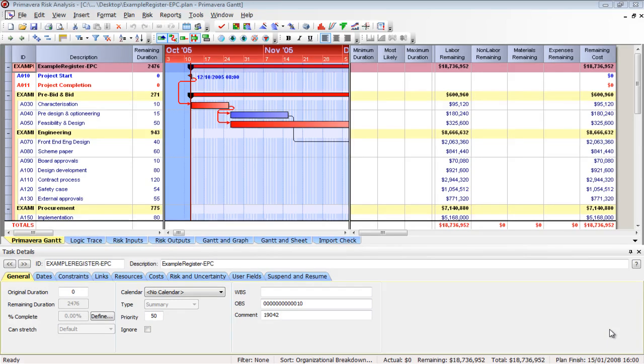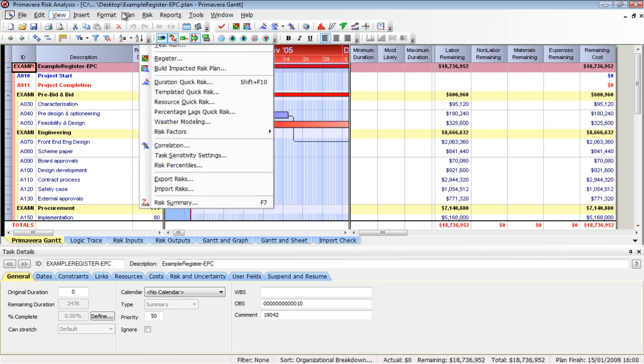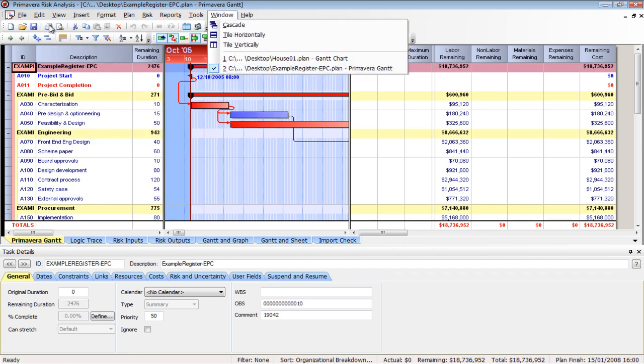The import log is always the first thing you should do as soon as you've finished an import from whether it's Primavera P6 or Microsoft Project. I've got two files open, so the import log is a little bit different from Microsoft Project than it is from P6. Same basic information, just different formats, so we'll go through both. So first we'll go through the P6 import log.